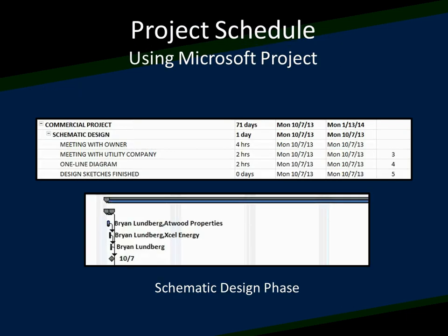transfer switch. So as you can see here, this is the project schedule. We use Microsoft Project to do this. This is kind of the schematic design phase that we have, meeting with the owner and utility company and putting together a one-line diagram prior to going into the actual design phase. You can see here, these are all pretty short steps, just a few hours for each. I don't know if that's necessarily realistic in one line in 2 hours, but anyway, so it's pretty small there